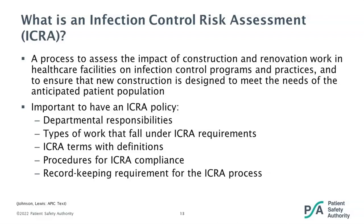A procedure for ICRA compliance lays out expectations and ensures everything in the ICRA will be followed. And finally, a record keeping requirement for the ICRA process. This includes any paperwork that's generated from the process — who will be in charge of the hard copy of the ICRA and permit, where will they be displayed and stored, and if there are paper copies of site inspections or negative pressure monitoring, you'll need to decide how those will be kept.